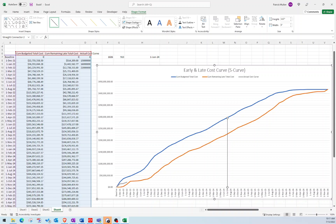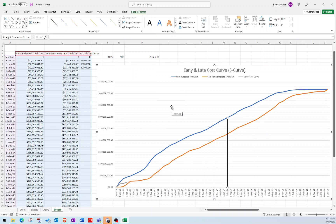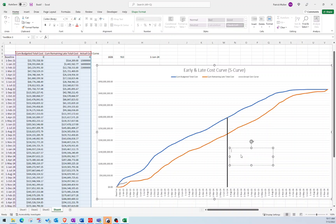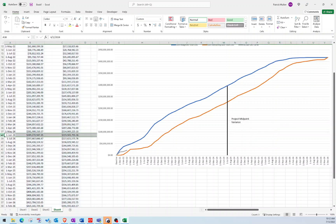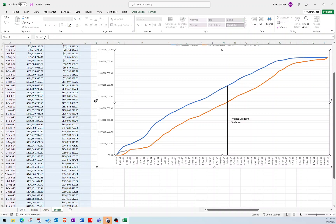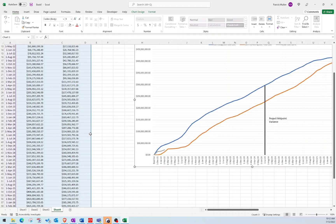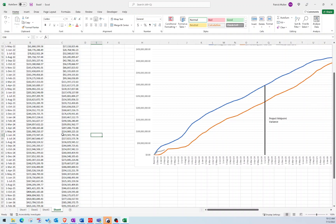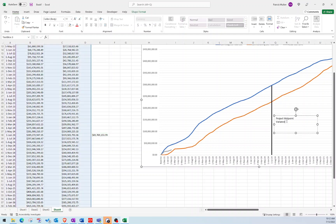And I like just messing around with the colors and the weights of stuff. So I'll just make that a three weight there. And then I can add a text box and I can just say project midpoint and I can say a variance. And what I want to do is I just go down here to June of 2024, which is right here. Let me move this kind of out of the way here. So I see June of 2024. I see here's my two values and I just like doing a variance between those two. I just subtract both numbers and we get $69 million. So that's $69,769,154.